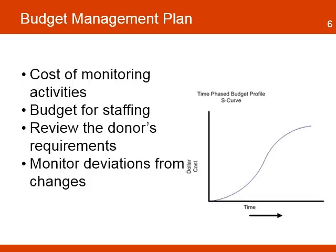The project budget also needs a plan. The plan will identify all the project implementation activities and their corresponding cost. During this exercise, the team will review the original estimates and assumptions. It's important to complete the review and ensure all the estimates are correct and the plan is not missing anything important, such as the cost for all the monitoring activities, the estimates for human resource costs including benefits, and a review of all the donor requirements to ensure the project is in compliance.